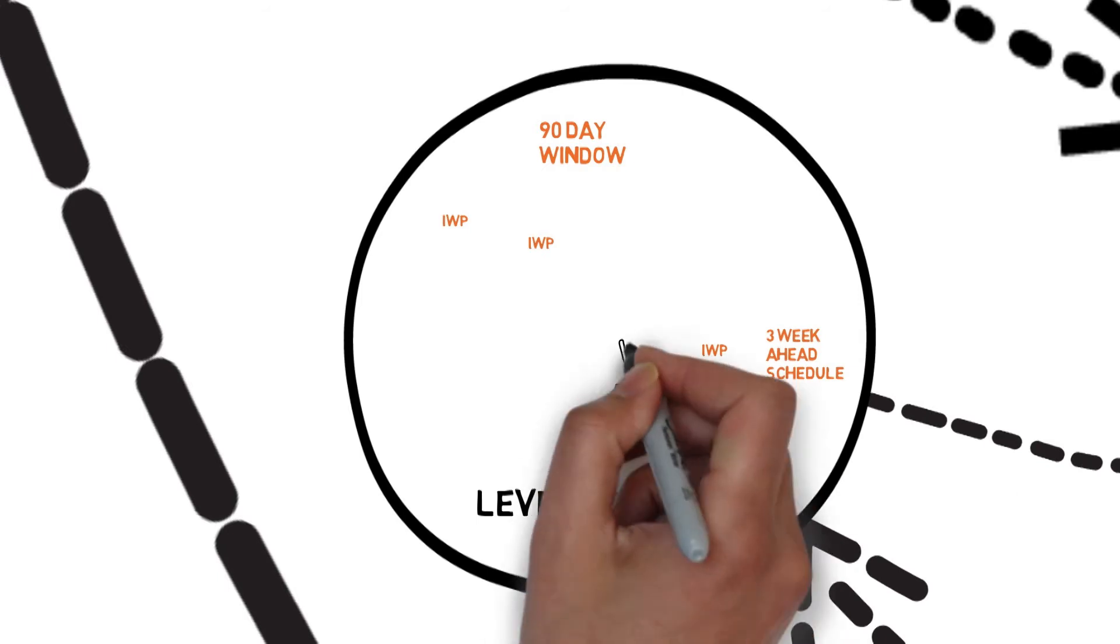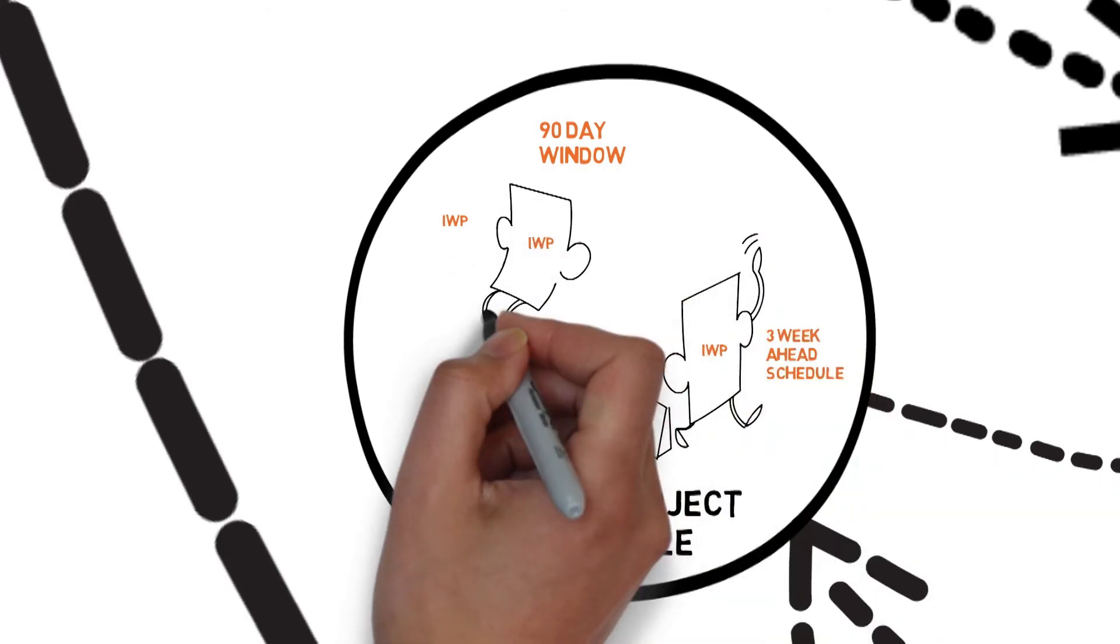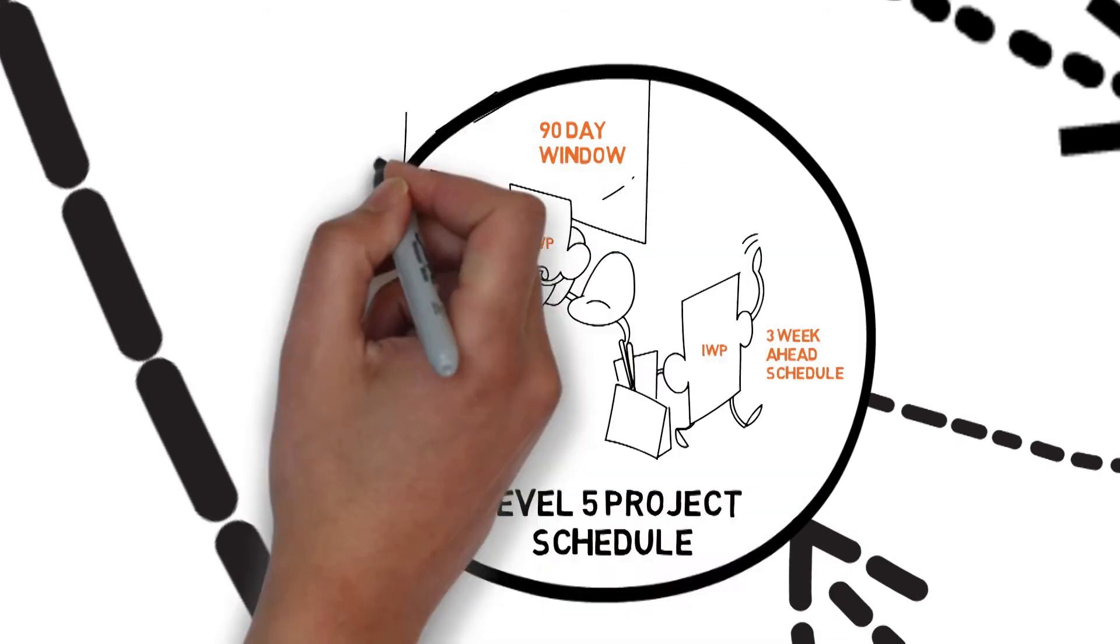As the materials are confirmed through soft allocation, the IWPs move into backlog, which is then used to develop the 3-week look ahead.